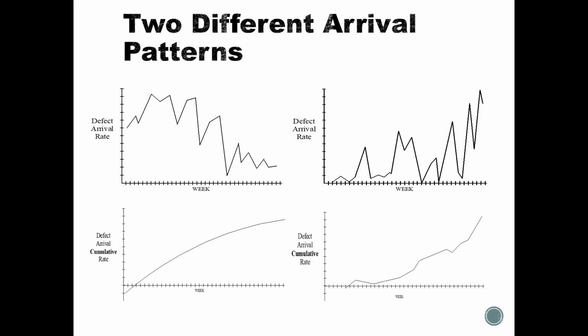For example, here we probably have managed to fix most of our problems because the amount of new defects is decreasing. Of course, with the same amount of problems, why is this rising constantly? Why is the trend upwards here? Or here it's plateauing, so we probably have found most of the serious problems. Here we are experiencing a catastrophic situation. So what can we expect in the future?